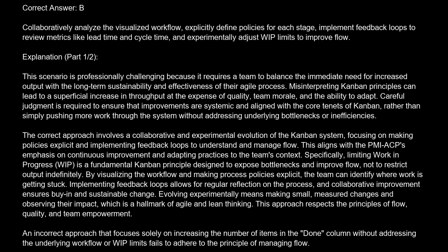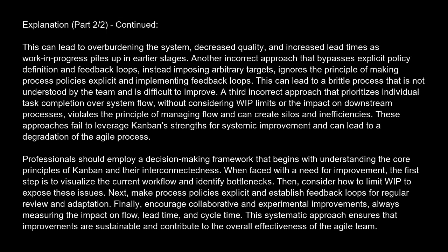Evolving experimentally means making small, measured changes and observing their impact, which is a hallmark of Agile and lean thinking. This approach respects the principles of flow, quality, and team empowerment. An incorrect approach that focuses solely on increasing the number of items in the done column without addressing the underlying workflow, or WIP limits, fails to adhere to the principle of managing flow. This can lead to overburdening the system, decreased quality, and increased lead times as work in progress piles up in earlier stages.